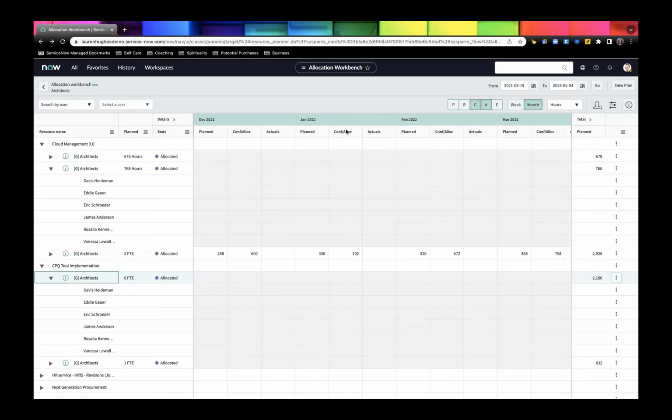If a user changes the schedule after allocating, time will come up as over-allocated, which is more than the time we specified at the property. So if a user changes the schedule for the resources, that's going to change so that they're over-allocated. So their schedule was reduced is what I'm taking from this. And then it's showing up that they're over-allocated. What would happen is it would throw flags and we would need to unallocate some of those hours or add a resource into the pool or something like that.